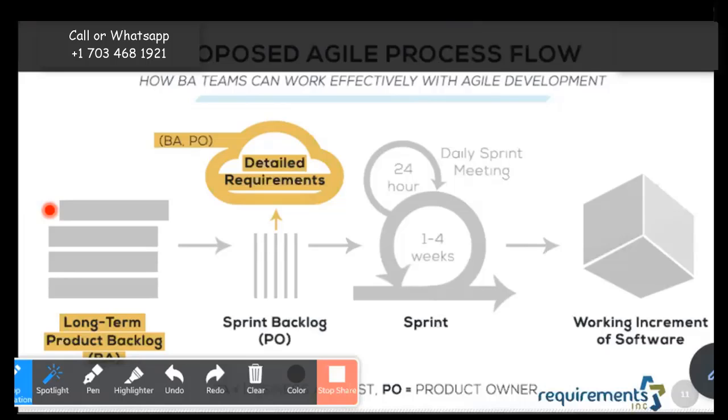That's 2 hours because I have to meet with them, I have to document with them. The next task is build an interface. The third task is do an initial system testing for my own purpose. So these 3 tasks are 2 hours, 4 hours, and then 1 hour, right?